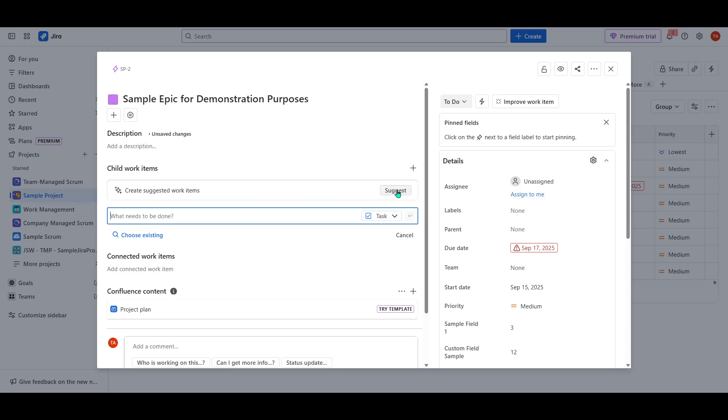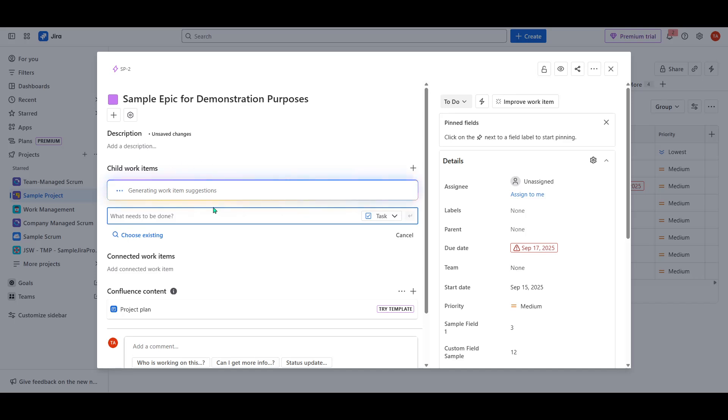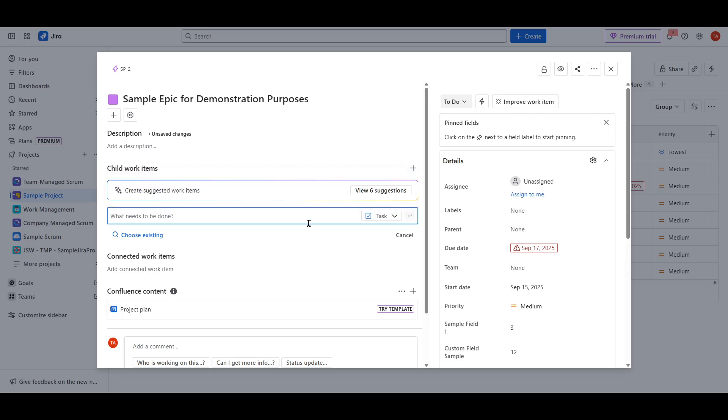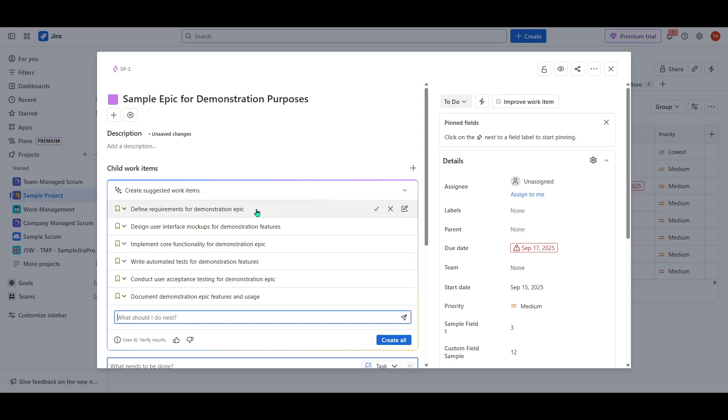Now, here's where the Atlassian Intelligence really shines. You'll notice a Suggest button nearby. This is your gateway to leveraging AI to assist you in generating these work items. Click on this button and allow the AI technology to get to work. This technology is designed to analyze the summary and description you've entered for the epoch, intelligently generating appropriate child work items that align with your project goals and the tasks at hand. It's quite remarkable how it can pick up on the nuances of your input and propose relevant items for you to consider.